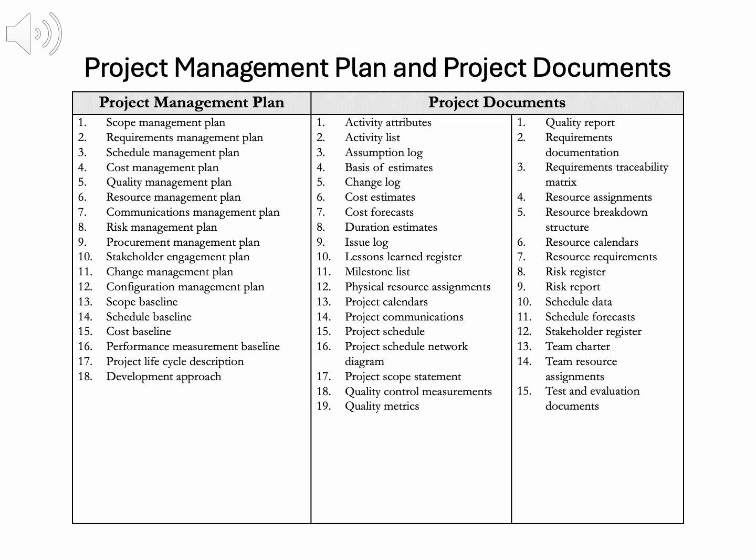information. For instance, if a new training requirement emerges, the requirements documentation is updated, and the project management plan may be revised if the change impacts scope or cost. This interplay ensures flexibility and accuracy. The plan facilitates communication with stakeholders, offering a high-level view, while documents provide specifics for team tasks.